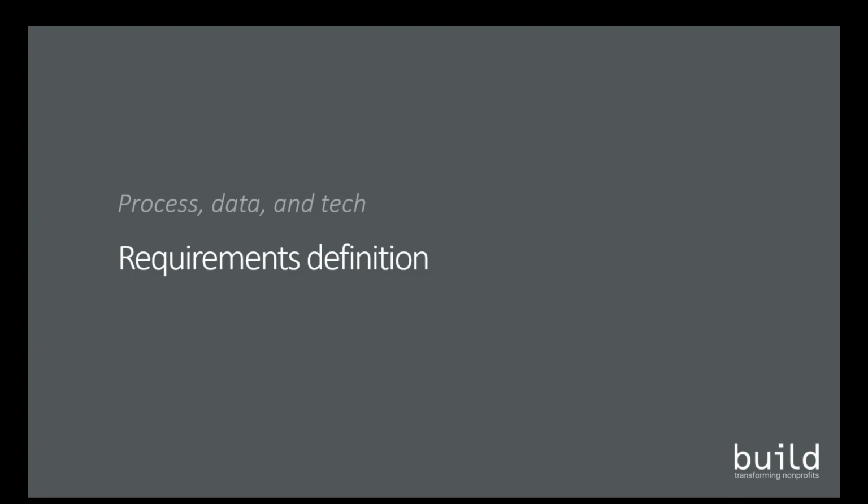So requirements definition proceeds like this. You itemize and describe the key processes that need to be supported by the system, and what data needs to be gathered in the course of those processes to meet your programmatic obligations or to take advantage of programmatic opportunities as an organization. An example of a business requirement would be the ability to transfer a case record from one counselor to another within an agency for somebody involved in human services.